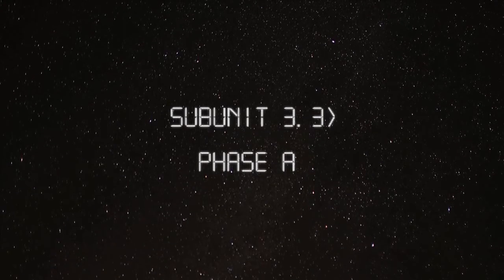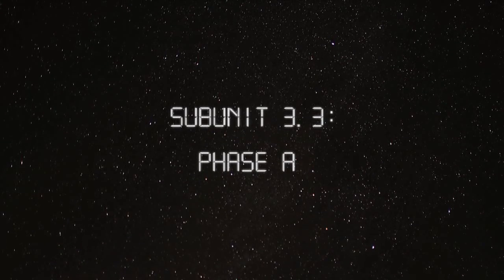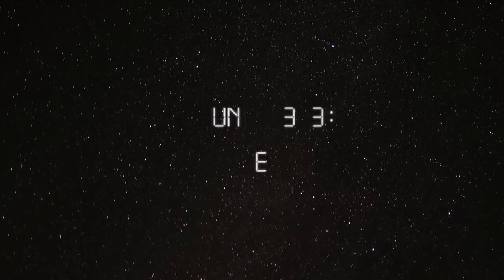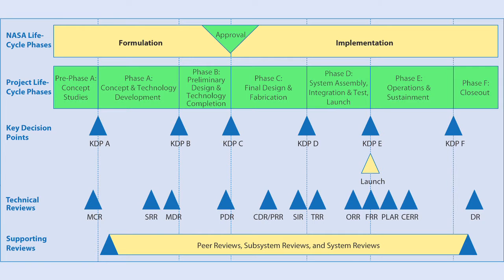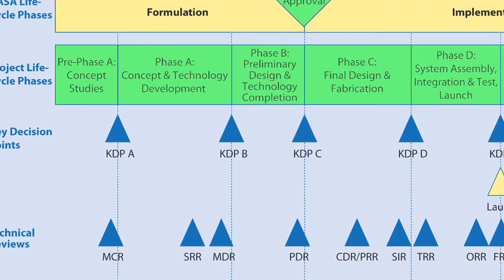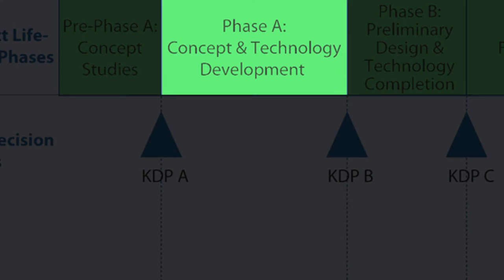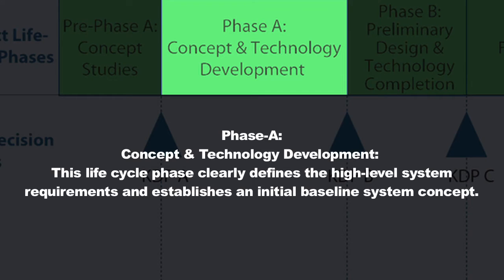Subunit 3.3, Phase A. Let's talk about what happens during Phase A. At this point, you've got some kind of baseline system requirements that you're developing, and in Phase A, you're going to really try to work on taking those high-level objectives that the stakeholders define and trying to make these requirements from them.